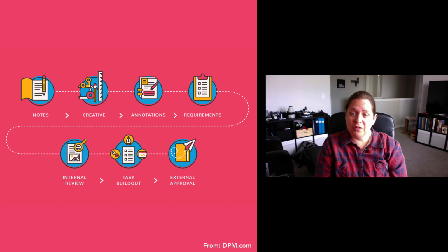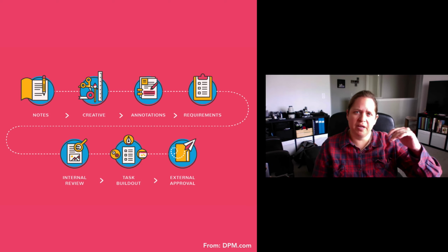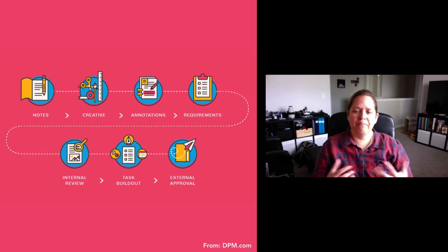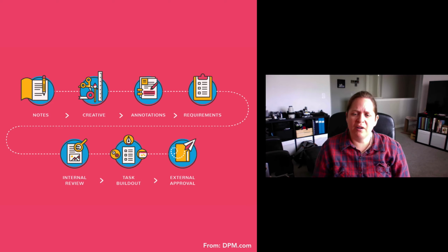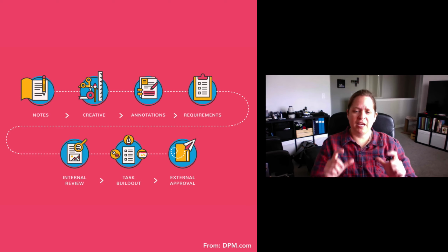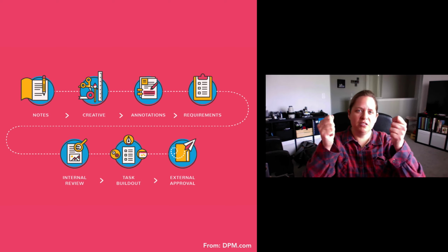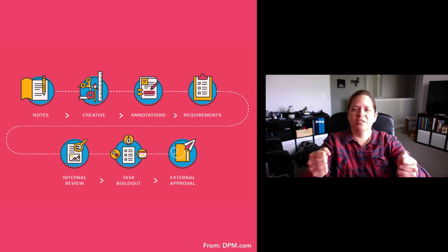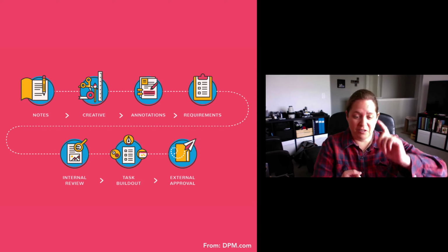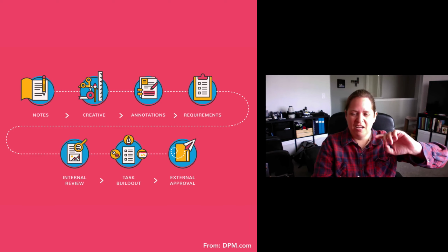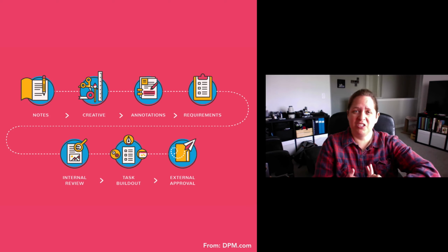So the project manager then builds out the requirements, and then there's a review, making sure that you're meeting them. And then you start doing the project, building it out. And then right before you launch, you say, all right, external approval. What do you think? Does this cat food meet your expectations? Is it dry food? And does it taste like chicken? Because guess what?